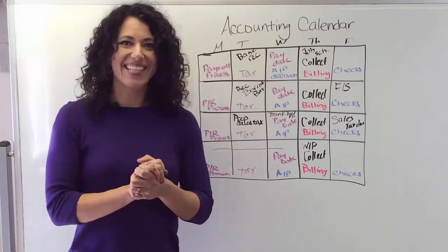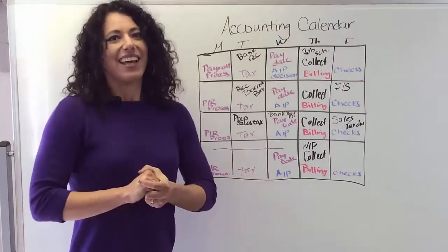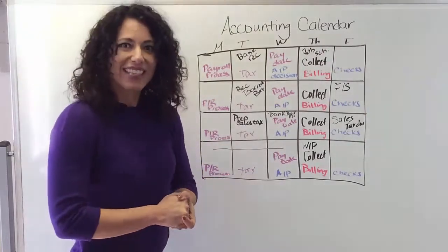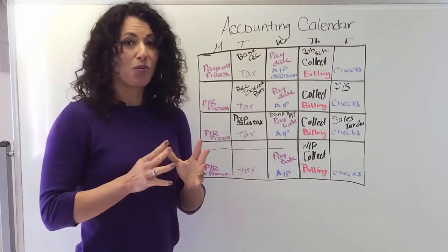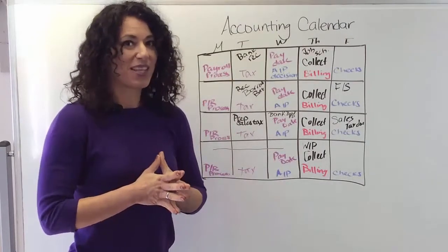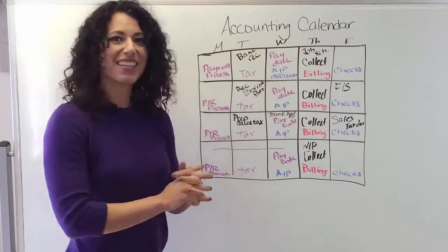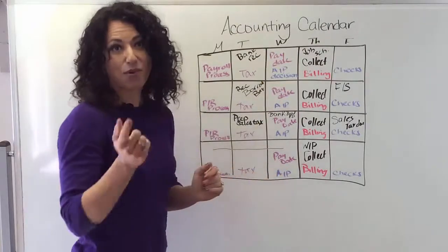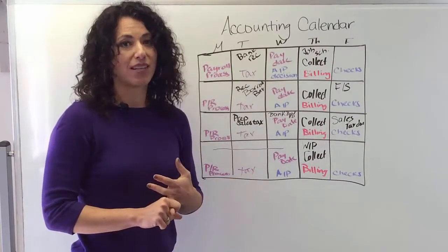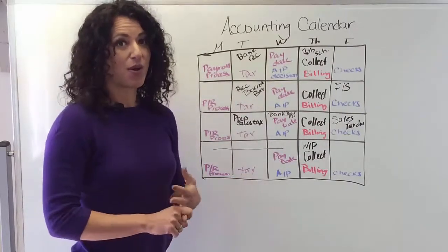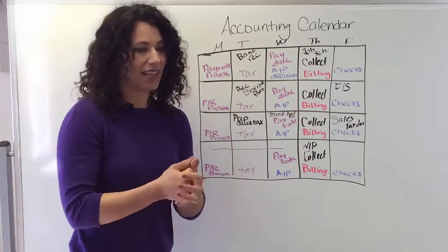Now, Melissa likes job reports once a week, but if I had to let you do anything less, it would be once a month, and it would be that day right there. If you want to run job schedules once a month, which I think is really great and the project managers might really enjoy it, I would run them on Thursday. We're picking Thursday because it's the same day they're going to bill, and it's the same day all the costs are accumulated. And in fact, those project managers might want to use their job report to prepare any billing.